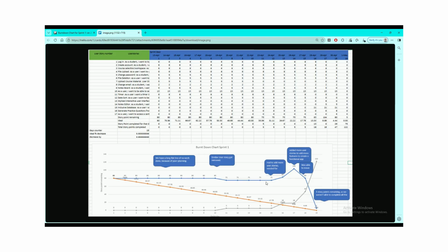Most of the user stories were getting developed and finished, but as we struggled to label them as done, they were left in the development or the testing stage, with us moving all of these already finished user stories to done at the last days of sprint 1. So that's why you can see that massive drop in the last 2 days of the sprint.